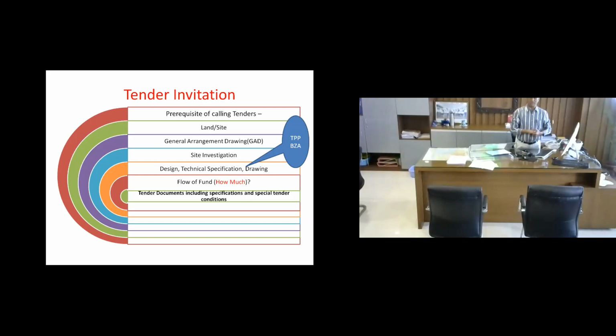Then site investigation. Site investigation is essentially required because, say, if you are in a coastal area, the geotechnical conditions might be totally different than if you are in, say, a hilly area or in a desertic plain. So site investigation is a must because that decides the type of foundation that you are going to construct, and that decides a lot of things like how much time you need, what type of foundation, how much cost, construction method, equipment required, experience of contractor in that field, and all. So it's very, very important that we devote time on site investigation.